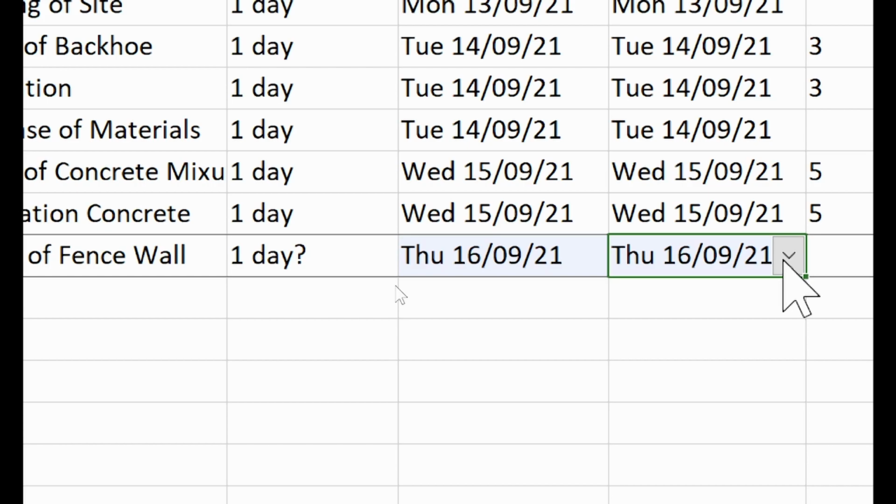Okay, we use 5 days for blocking. Is that realistic? If we have 5 masons and the number of the blocks, then we know that one mason can lay 120 a day.